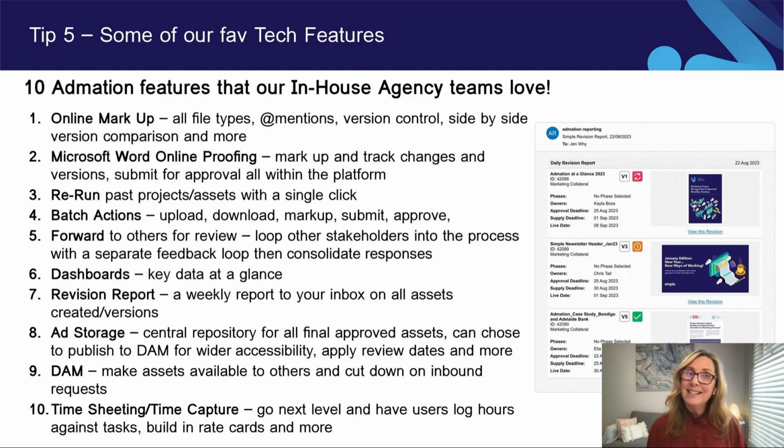The last thing that you could consider if you really wanted to go next level with resource management is going into time sheeting or time capturing. And that's actually having your team members logging the hours that they actually do. So you've assigned them a task. Perhaps in that task, you've said the estimated effort is, you know what, I think this will take you 3 hours. And when they complete it, they actually log how many hours it did take them. This is a great way to be able to see, are we being as productive as we think we should be? Did a task that should have taken 3 hours take 2 or take 5? You can also build in their rate cards and lots of other features to really go next level on managing the resources of your team.